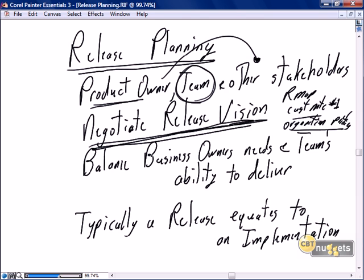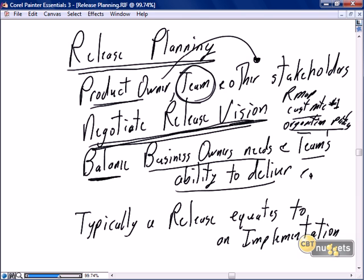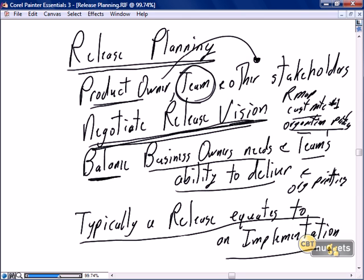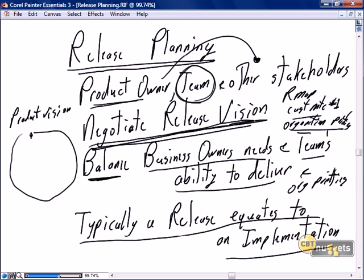So we need to revise our product roadmap and develop a release vision that better aligns with organizational priorities. Once the release vision is negotiated, we then have a fine balance between the business owner's needs, the team's ability to deliver, and organizational priorities. Typically a release equates to an implementation. The product vision is segmented into releases, validated that the team can deliver and that we're consistent with organizational priorities.